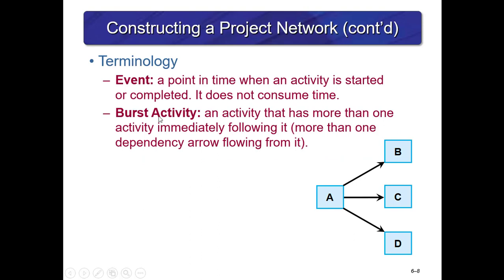More terminology: an event is a point in time when an activity is started or completed; it does not consume any time and can also be known as a milestone. A burst activity is an activity that has more than one activity immediately following it. In this diagram, A has more than one dependency arrow flowing from it — B, C, and D are dependent on A — so A is a burst activity.